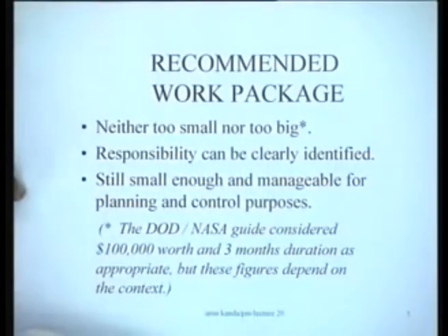And the work packages should still be small enough and manageable for planning and control purposes. So, these are the three major requirements of a work package. What we now conceive is that the original project network is now conceived in terms of these manageable work packages, and we develop the project network in terms of these work packages, where the work packages are regarded as the activities of that particular project. The work packages could then be a combination of the original activities, or a sub network of the original network could be a work package in that sense.